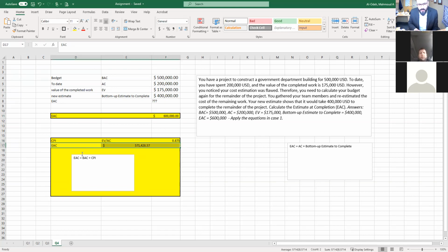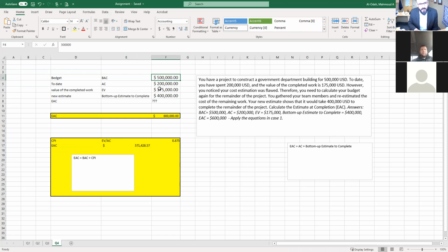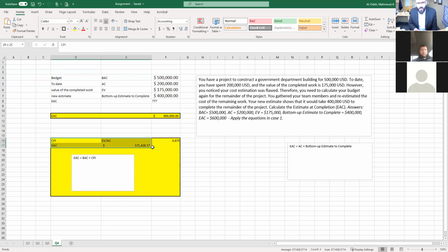So you say, okay, based on your performance so far, yes, initially you underestimated the budget. You did come up with 500, but actually what you need now, I hear you need 571, not the $600,000. So as top management, they would use it to negotiate with the team members on how much the new budget should be. They should say, okay, you asked for 600, but based on your performance, this is what you should get, the 571,000. And then they might ask for more detail on why you're asking for 600.